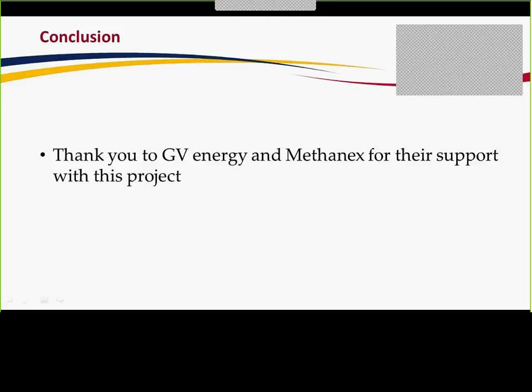The big ones were engineering issues and site development issues. Okay, all right. So somebody else here has said that most of the big issues right now in our estimate that are causing risk in the capital cost are the site development and the methanol evaporator. What was the other one? And the fact that we don't have any civil or electrical estimates. Well, the civil and electrical is built into the factors. So, but we haven't looked at it in detail.